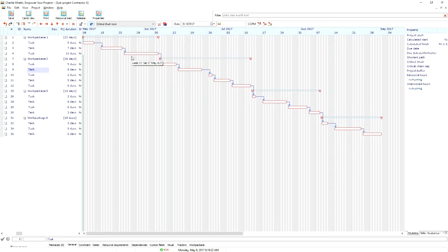It is totally reasonable to ask your subcontractors or alliance partners to share with you the tasks on the critical chain of their projects. It is absolutely no problem. And to constantly demand updates from them on the progress of just these tasks. That should be their prime focus, and you don't need more information.